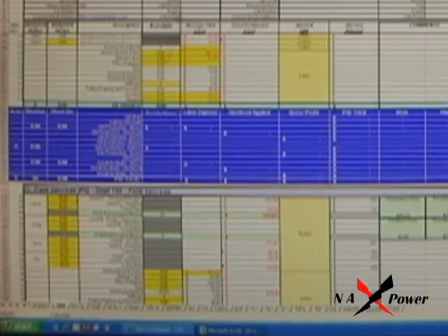If you want to modify the number, you can see right now that we have a crew size or calculated field service working days of 2 days, total field service labor hours is 41. As a result of that, we need a 3-person crew.